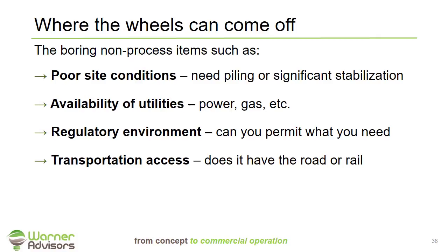Transportation access. This is really going to depend on your type of materials and really the value of your materials. For lower cost commodity materials, the transportation could be quite a big deal, especially if you're looking to ship by water or rail. There's a lot of expensive infrastructure that can come with that, and that's something that has to be known up front.